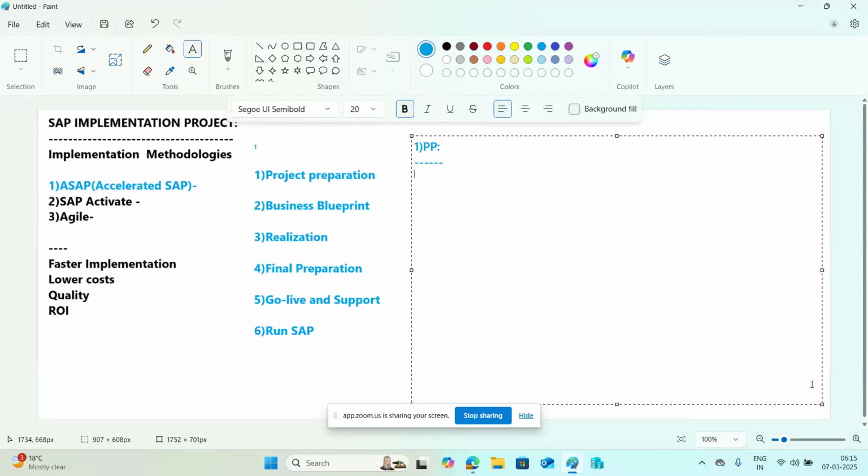Once one company wins that bidding, the company and the client start discussing the project activities, the purpose of the project, the project goals, what your scope of work is, what your objectives are, and how many team members are required. Then people start identifying the team, onboarding the team, and training the team members. All these things they perform in the project preparation activities here, right?